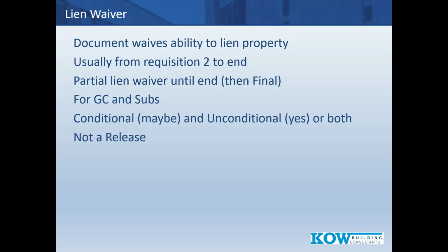And one of the subs must have mentioned this to an attorney and said, you know, I'm not going to get paid on this. I signed this lien waiver. And they said, whoa, you're going to get paid. All you've given up is your right to lien, not your right to claim that money. So long story short, there was a sit down, everything worked out. But it was interesting that I got to hear from an attorney's mouth, which is exactly where I like to get legal replies, who said, XYZ individual, they gave up their right to lien, but they didn't give up their right to claim the funds. So it's not a release. It's just waiving the right to lien.